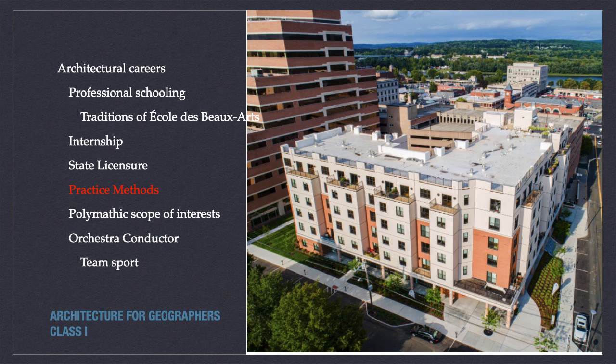By 1918, they had codified a set of interlinking agreements between client and architect, the A101, between the engineer and architects, consultants, and the general conditions and agreement between the owner and contractor. This established a standard of practice for the industry that's the standard even when other agreements are used.